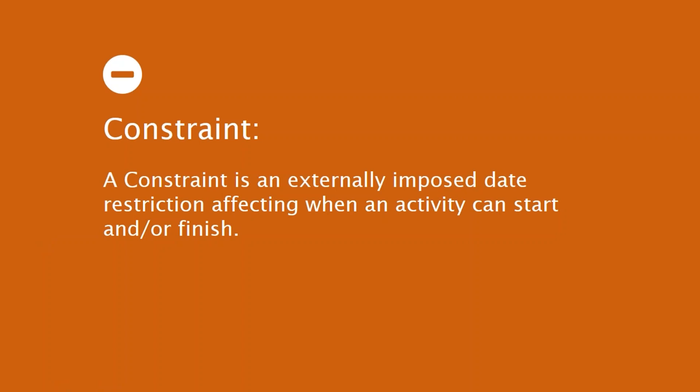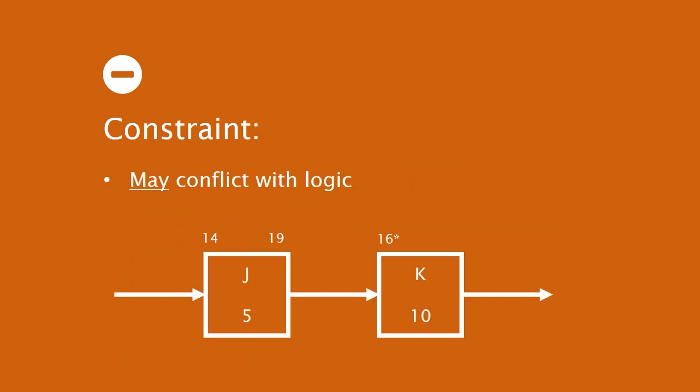We are the external factor applying this imposed date restriction to an activity. Constraints are applied to an activity. And the way I like to describe it is that we use constraints to help adjust our schedule to the real world. Now, the challenge with constraints is that they may conflict with logic.